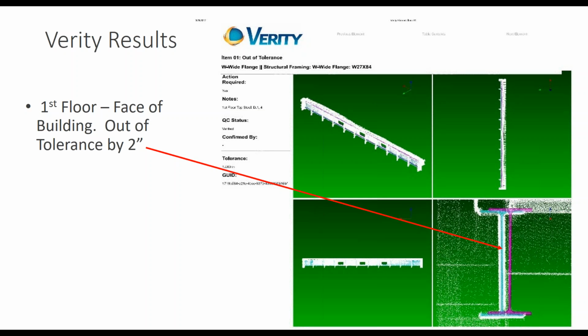Visually going through and looking at stuff, you can determine whether each is an actionable item or not. And then I basically ran an action item report that totaled the 45 items that we deemed to either need a further look from the field team or to fix in the field, really.